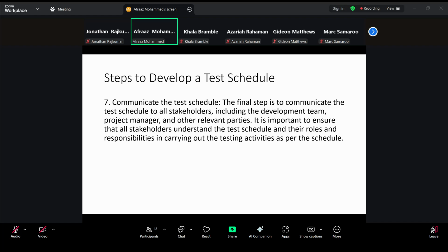So what they did is we needed to have meetings every day, basically reviewing the project plan, right? So the project manager would go through the plan, and everyone responsible for a particular system would have to report on it. So it's going according to plan. This is what we did. If there are any delays, if there are any issues, any red flags, this is what we had to discuss, right? So there's that communication. If there were huge delays, that was communicated even further up to expect certain things. And it will be addressed differently.